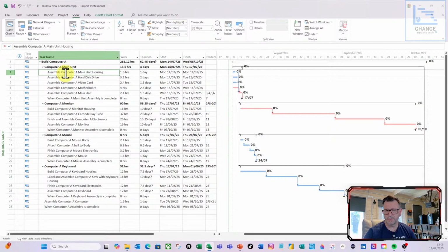So in this case, we're going to tag our program level milestones accordingly, and in the same breath identify those which are project level that the project manager might want to track, and also which are not milestones at all, so we can keep them out and stop that noise, i.e. you can't see the wood for the trees, and prevent that.